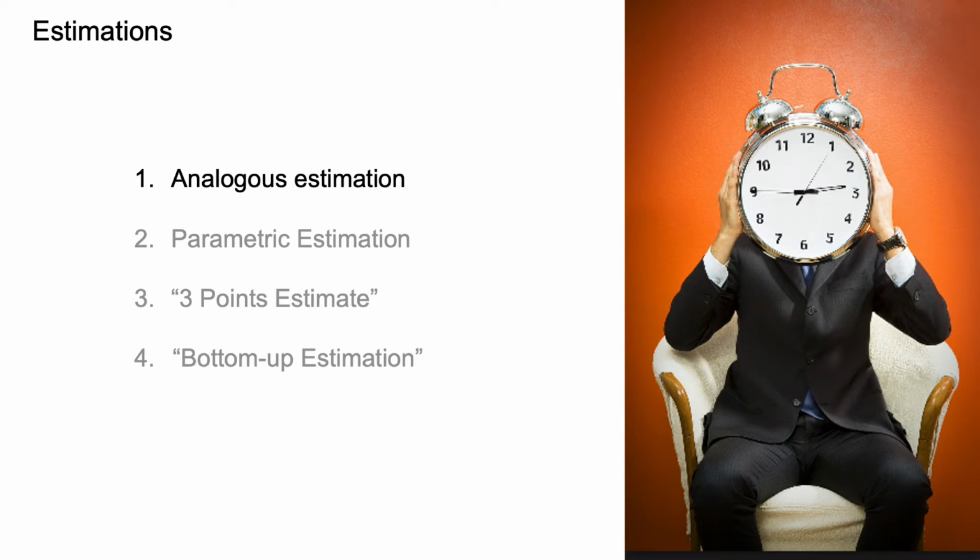If the cost of the landing page was $200 and you have to develop a similar landing page, probably it will cost you $200. But it's not so accurate, since there is always a big risk that it will not take 2 weeks for a new similar landing page and it will not cost you $200. You just use it as a baseline for your estimation when you need a very high level of estimations.